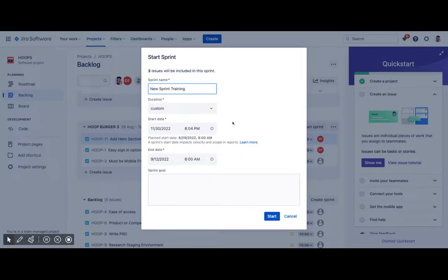If you don't understand what I mean by sprint, basically this is a period in which you want to deliver a set of tasks, right? And the sprints can run for 2 weeks, and in some cases, based on the complexity of the project or product being built and how the team runs, they could run the sprint for 4 weeks.